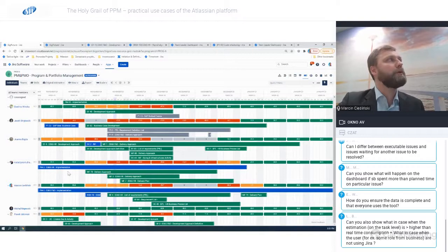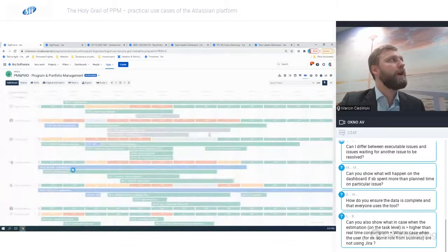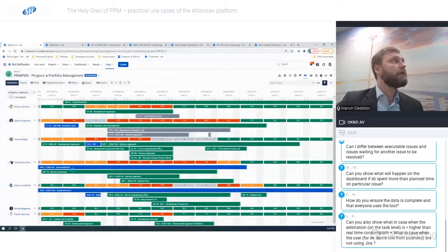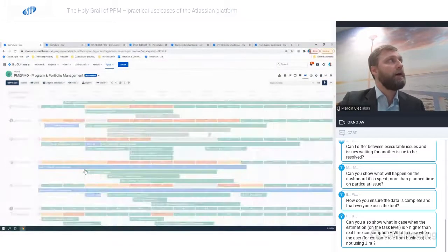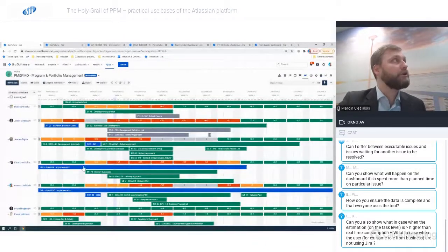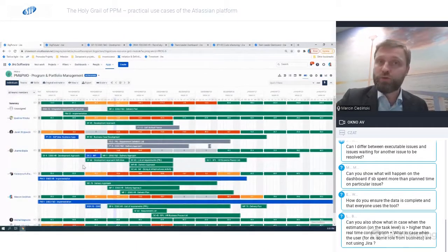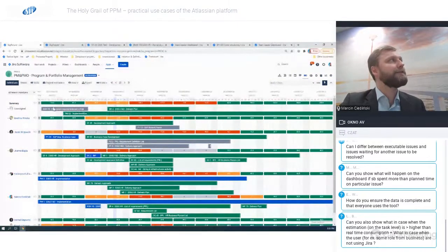Well, first of all, maybe we can try to prolong a different task, or if those tasks cannot start at a particular date, maybe we can ask her to do some other work. So let's see, we have quite a couple of activities that are unassigned. We have a risk that is unassigned, we have an implementation and a delivery plan that are unassigned.